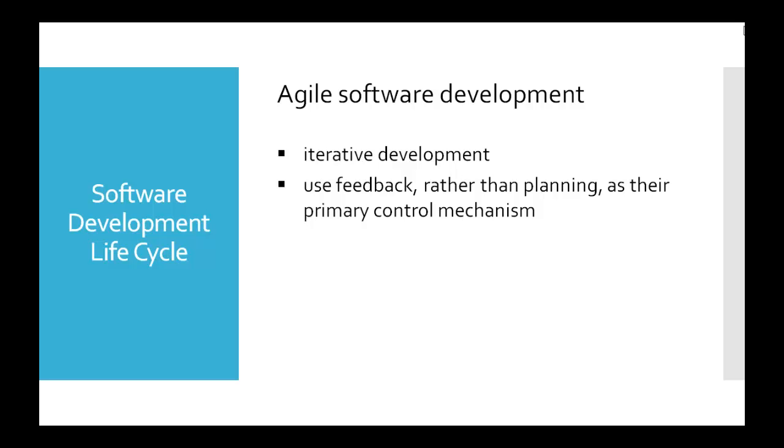Agile model uses an adaptive approach where there is no detailed planning and there is clarity on future tasks only in respect of what features need to be developed. There is feature-driven development and the team adapts to the changing product requirements dynamically. The product is tested very frequently through the release iterations, minimizing the risk of any major failures in future. Customer interaction is the backbone of agile methodology, and open communication with minimum documentation are the typical features of agile development environment.